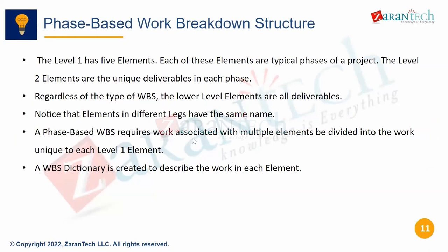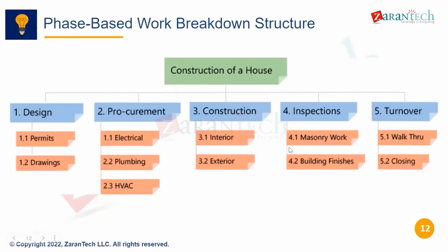Phase-based WBS requires work associated with multiple elements. We divide into work unique to each level one WBS element. A WBS dictionary is created to describe the work in each WBS element. That dictionary and all that is construction or manufacturing terminology. What is design? What do procurement and construction mean? They'll have their own dictionary. What is this 1.1 permits and drawings? They'll have the details maintained for that.